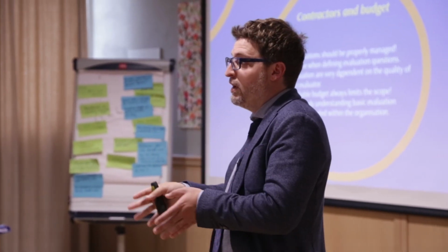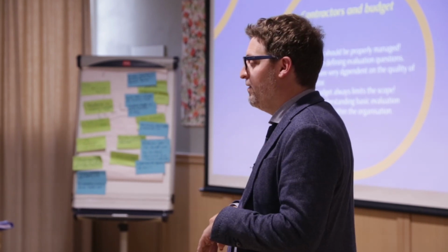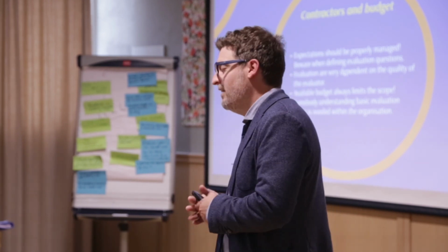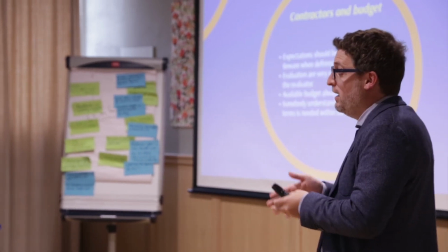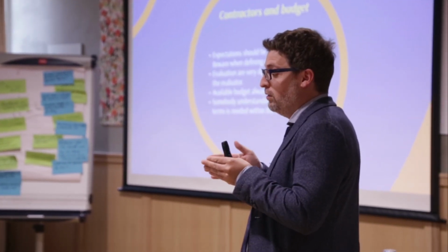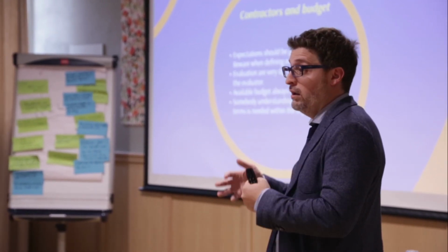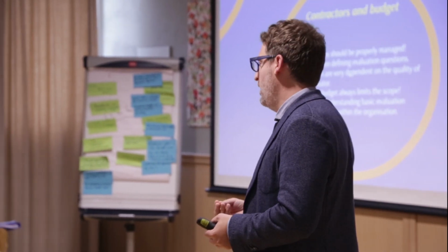You can't have a kickoff meeting and say, see you in a month. And then they come back with an inception report and say, oh, good, see you in 3 months. We tried, it doesn't work. You have to be in the role to make the decisions. And if you have to cut some parts of the evaluation because it's not working out, it's better earlier than later. It's much better for you if they tell you in a week, sorry, it's not working because our assumption was that this data is available in the statistical office.